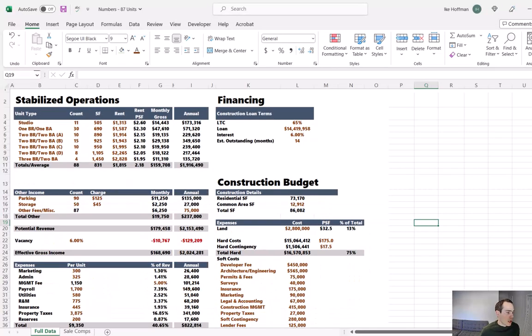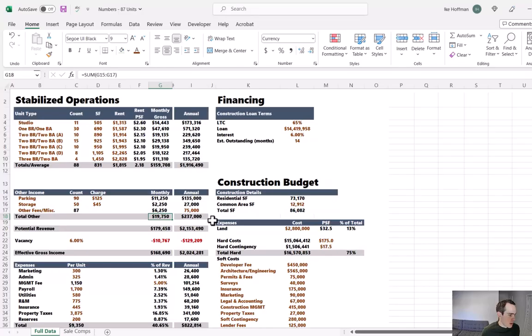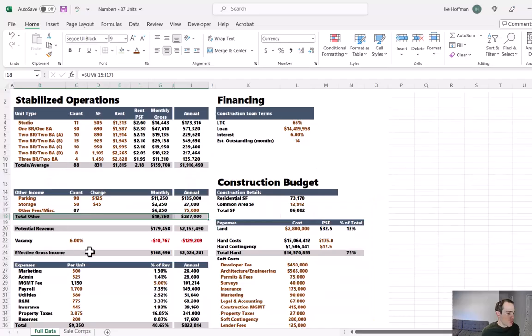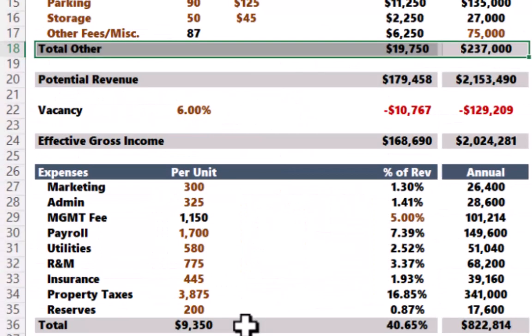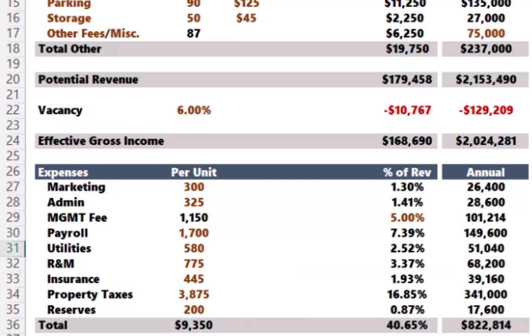You may also recall that we initially projected $250,000 in other income potential. Unfortunately, that number has come down a bit. When we tally up parking income, storage income, and other miscellaneous fees, we're only getting to $237,000. So we lost a bit of income there. The good news is on the expense side, after talking to a qualified property manager that has experience managing this asset class, our total expenses came down from an estimated $911,000 all the way down to $822,000, which is closer to a 40% expense ratio, when we had been originally projecting a 45% expense ratio.